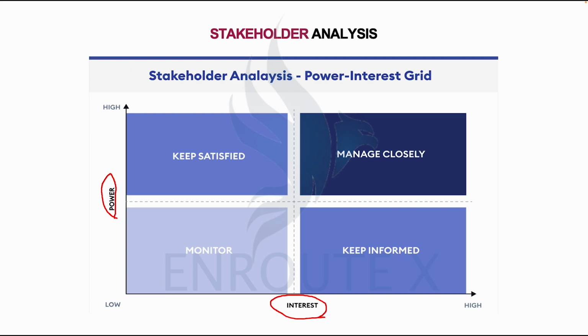Where you have a stakeholder that has high power and also high interest, you manage them closely. You do not want to offend such a stakeholder.